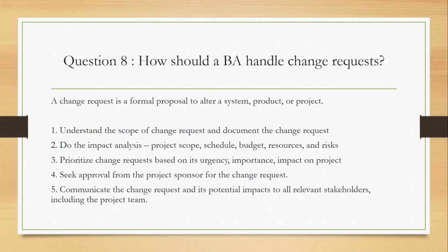And here, you need to understand the scope of the change request, document it, and analyze it. You need to think about the budget, resources, and risk of that change request, and prioritize it based on urgency. Then you need to send this to the change control board. According to the organization, it may be called the change control board or the control change board.